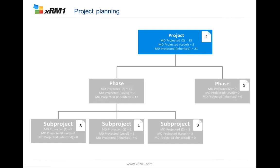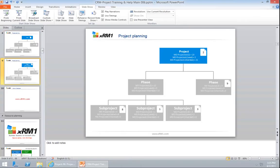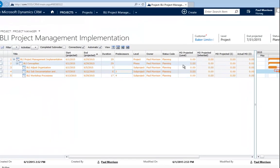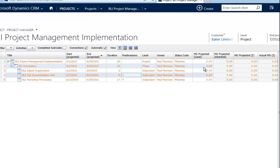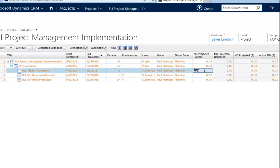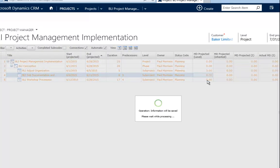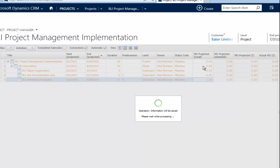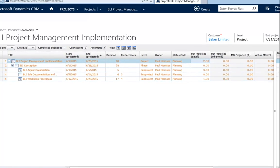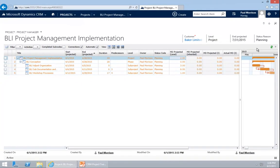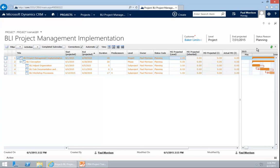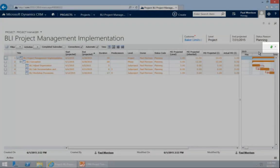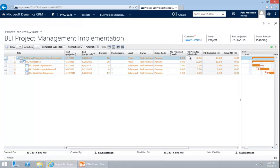How can I set this up in the system? Again, you can only put in the information on the level itself. So I go in and enter these times on the level. So organization is 3, documentation is 8 and workshop is 1. The project management itself, it's 2. Most cases it's about 20% of the time that you have in sum. Now, the inheritance gets calculated by the system. It does that automatically. All you need to do is recalculate or refresh the screen. And we will see that the inherited and projected is filled.